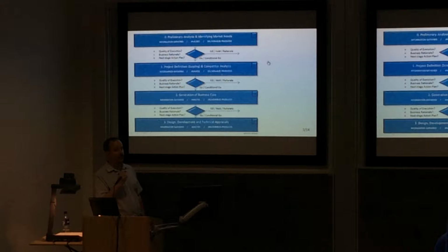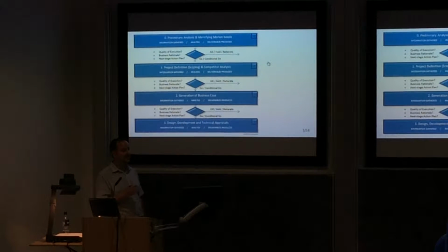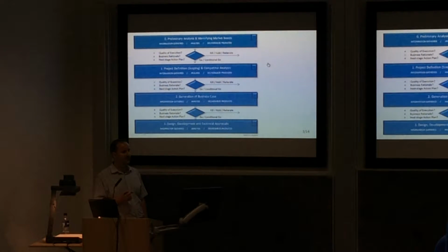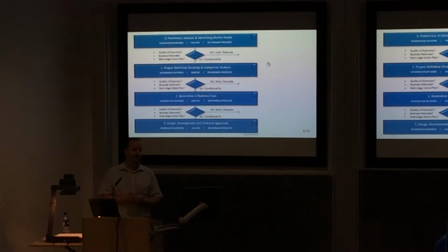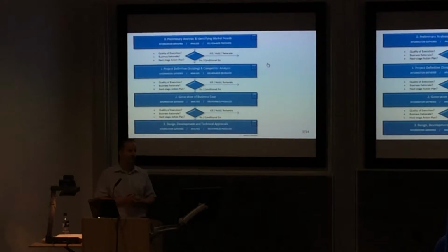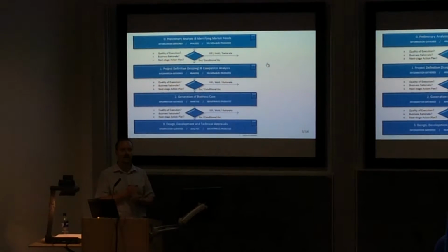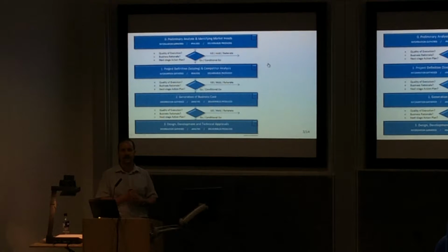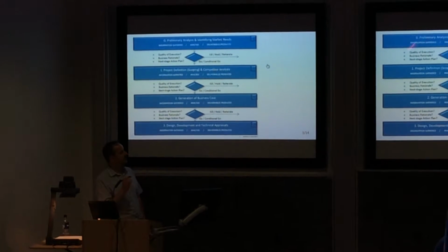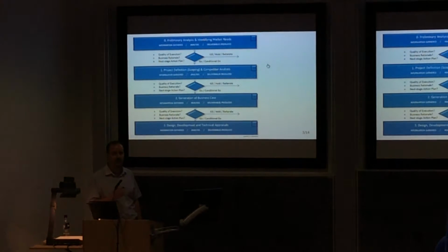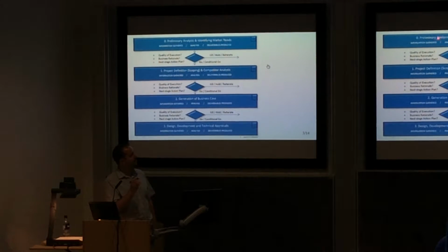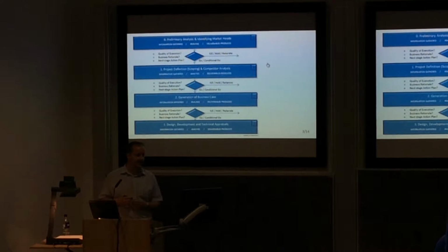There are questions that you should be asking yourself at each of these phases. What is the quality of the execution? I.e., how well have you done that process? Is there business rationale to continue with the process? And have you got a next stage action plan in place for moving into the project definition and scoping phase? Usually, you've not invested too much time, money, etc. in the stage gate process at this point, so it will move without too much difficulty into the project definition.